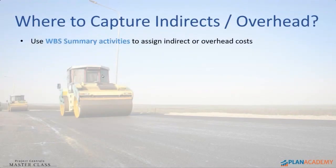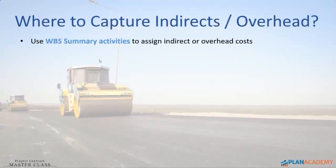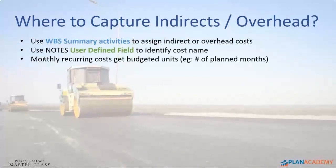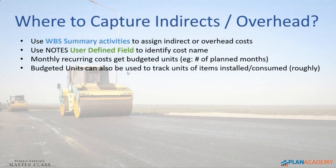Where to capture indirect and overhead information. Some costs are indirect and we have overhead — we will use WBS summaries for those. I used basically two or three WBS summaries in the whole entire project with no relationships. I also used a user-defined field notes to identify the cost name. Monthly reoccurring costs can have a budgeted unit associated with them — I'll show you what that looks like.